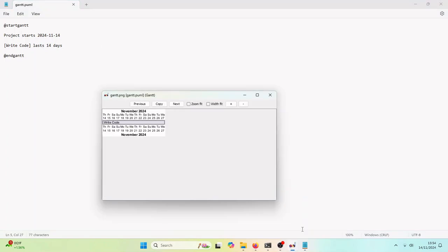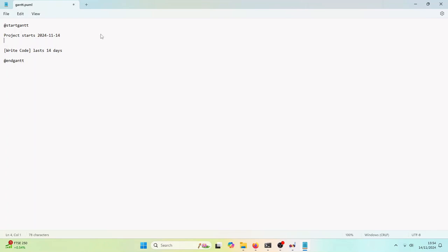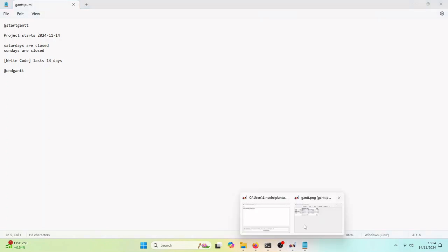But we've got people working on Saturdays and Sundays. Don't really want that. So back to our code, and we can set it up so that Saturdays and Sundays are closed. Tidy it up. Save it, and then you can see that we're not working weekends anymore.